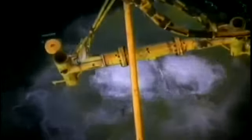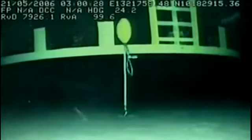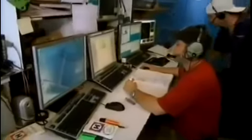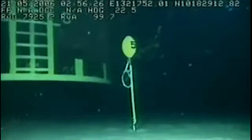Then, in a blast of escaping air, it's on its way, a 4-hour journey nearly 2 miles into the depths. The huge anchor has to be placed within a hair's breadth of a buoy set on the ocean floor and set at the right angle. Wind isn't a problem, but currents are, and the Balder's engines strain to steady the ship. If the piling isn't installed perfectly, the massive tension of a 2.5-mile mooring line could rip it apart.